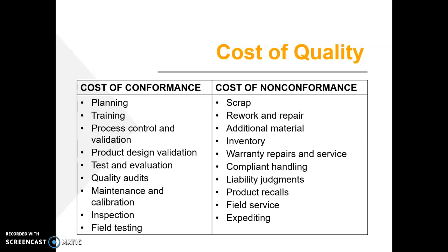But if you do test things regularly and go to the trouble of doing the training and the planning, then you're going to avoid the cost down the road of having to scrap certain deliverables because they don't meet their quality requirements. You're going to save yourself having to go back and redo work or repair faulty deliverables. That type of repair work requires additional materials.